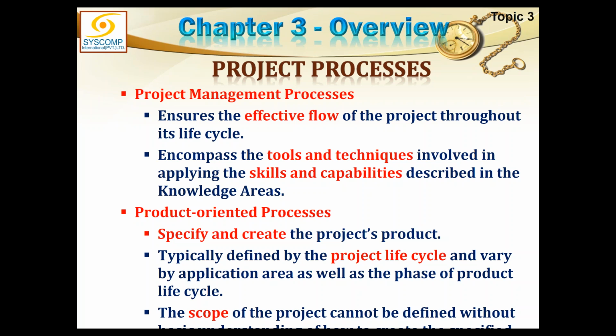Because when we talked about the project life cycle, you remember I said it is not the process groups. The project life cycle is how the actual project is going to happen. How are you going to bifurcate or segment it into various phases, and those should be sequential phases. So those sequential phases would actually be doing the product oriented work. Every phase would have a deliverable to deliver, certain requirements to meet. So every phase is a mini project.